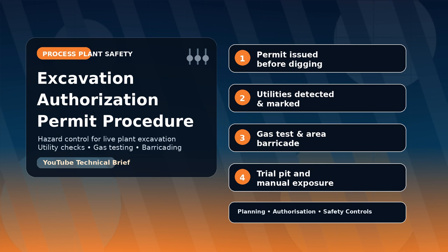Based on their experience, they will write if there is a possibility that some cable will be in this location, so you need to consider everything there. Then the fire team, for fire water lines. Some telecom cable could also be there. You need to obtain permission from all of them.